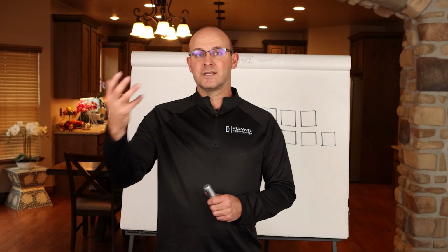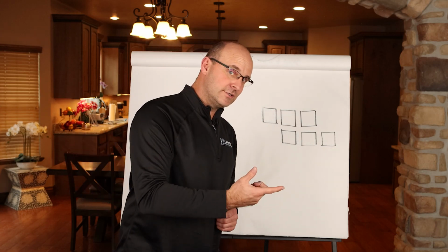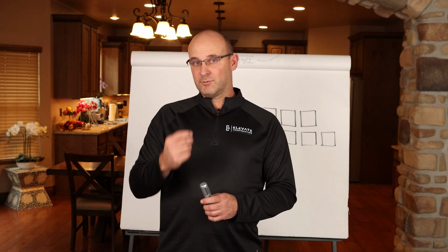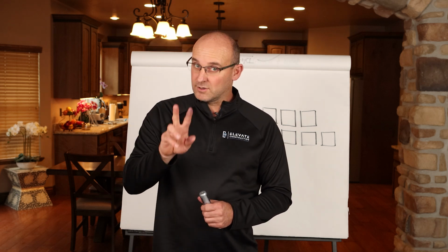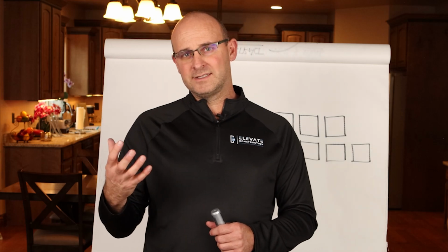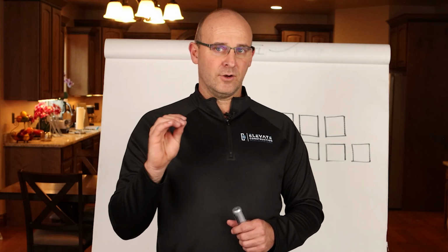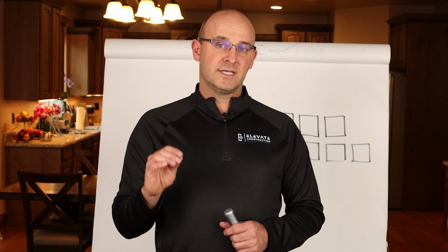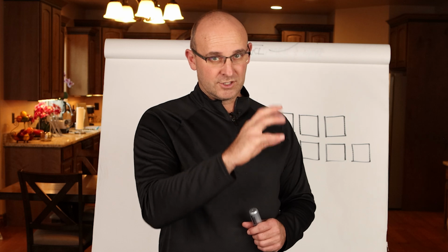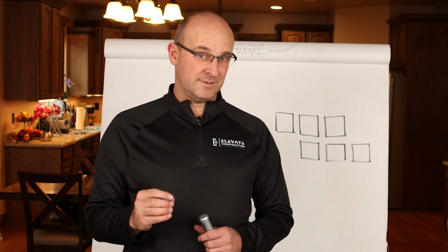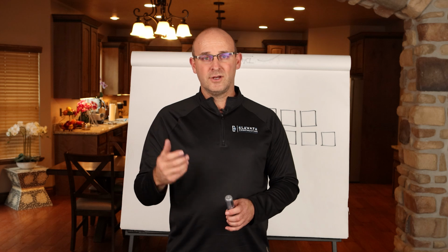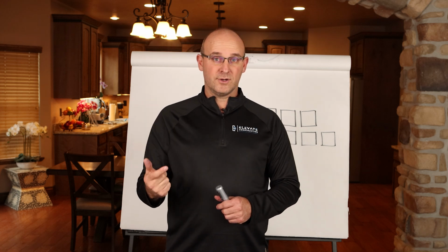To do a baseline comparison and actually use the baseline, you've got to maintain those same activity IDs, the same work breakdown structure, similar logic, and a similar organization. Which means that for the most part, if an owner or an owner's rep or a scheduling third party really wants to stick you to it, they will restrict your ability to modify and update that schedule because they want to compare it. And that's not realistic in construction, because we know that construction is going to change.